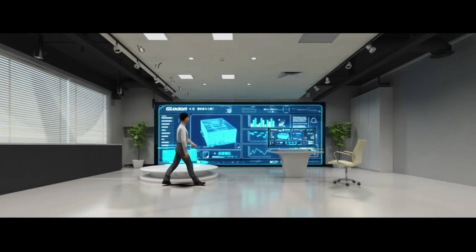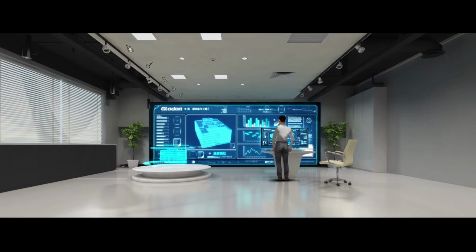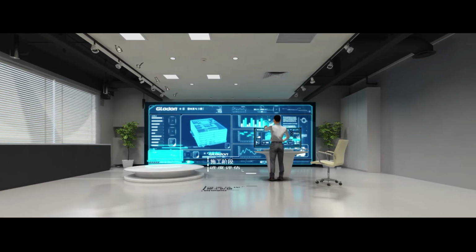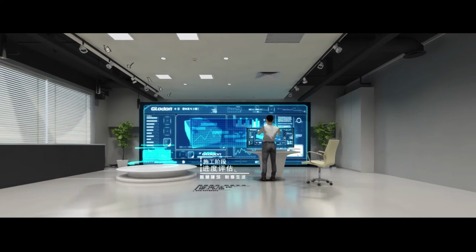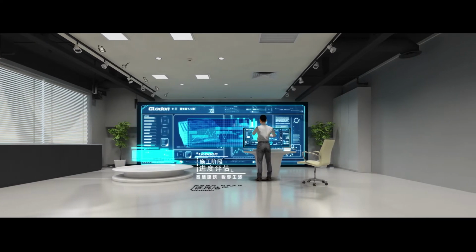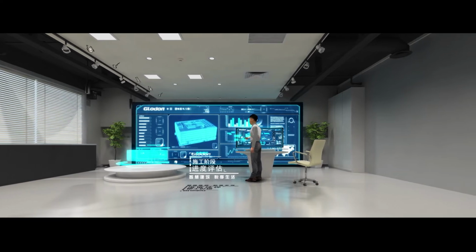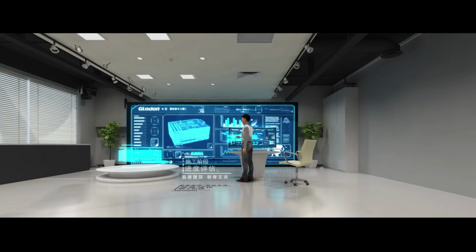At the construction stage, BIM-based 5D simulation of construction enables contractors to get control over project progress and constant changes, and obtain fast access to plans of quantities, materials, and labor for optimizing resource allocation, controlling project costs in a timely and accurate way, and achieving lean management of projects.